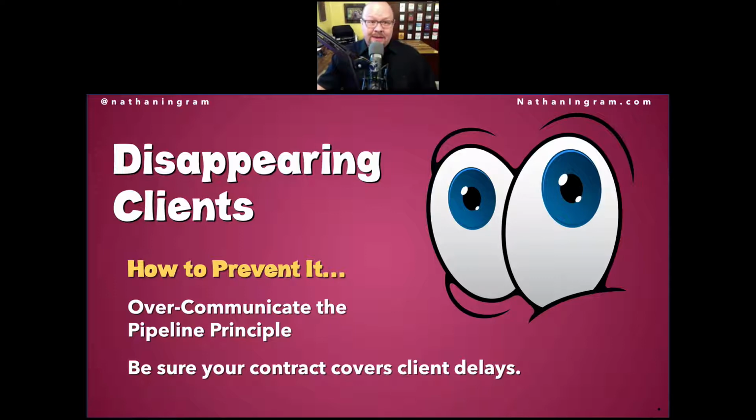Our business has to make money. We have to eat, it's just the way it goes. And so when your work comes back in, it's going to be at the back of the line, and it may take us 2 or 3 weeks to get back to it. So it's going to be in the pipeline, but it's going to be at the back of the pipeline. So you want to over-communicate that to the client so that the expectations of your client stay on track.